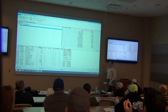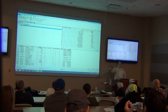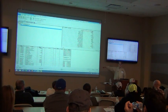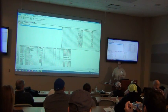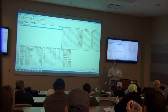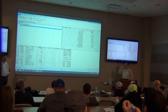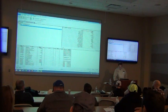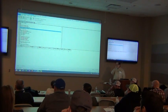There are a lot of people who, if they do something consistently, have a window where they're expecting a unit cost. For example, the spreadsheet shows the cost per thousand square feet and associated money, which gives a unit cost. One contractor I worked with had a number in mind for every item — if it wasn't that number, they had to go back and rework it. He had a good enough handle on unit prices that he could tell when something was out of sync.